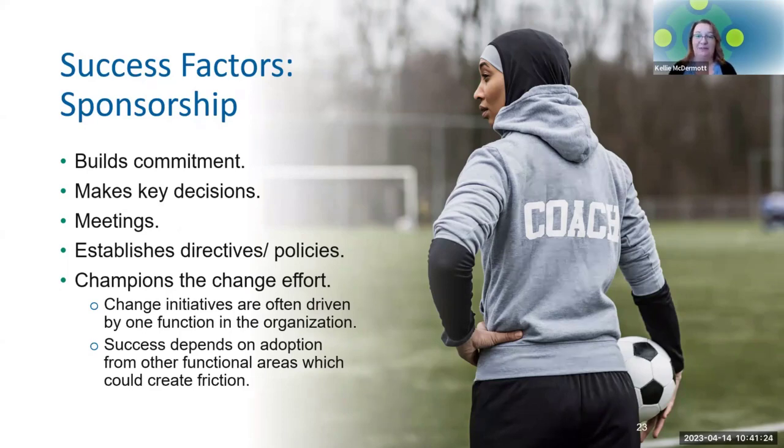Now, we have this question a lot in project management also, because strong sponsors, visible sponsors, active sponsors are important in project management also. What do you do if you don't have an active, visible sponsor? Well, then it falls on you to help create that sponsor and the image that you need them to be. And if that means that I have to craft an email and send it to the sponsor and say, hey, would you send this out to the team because it means more coming from you than it does me, then that's what I'll do. If that means that I need to schedule 5 minutes for them to come into a team meeting at the beginning to talk about how we're doing, or to give them names of the people on the team who have done a really good job lately, whatever that means, to help them stay actively and visibly engaged with the change is what you would need to do as a project leader or manager.